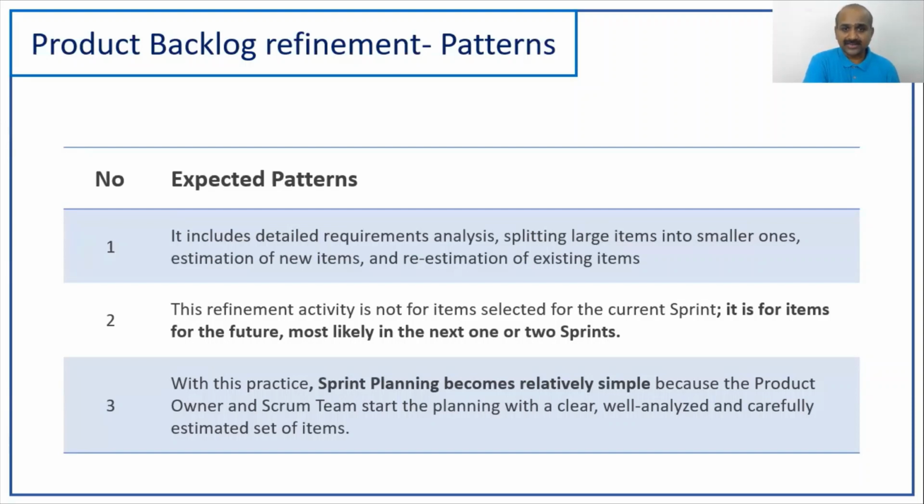The product backlog refinement session happens in the mid of the sprint. Okay, the duration should not be more than 10% of the capacity of the team, right? And it should happen in the mid of the sprint so that people are not bothered about either sprint planning or sprint demo. That's why in a 2-week sprint, it happens on the 5th day. Okay, and you can as well conduct 1-hour sessions on the beginning days of the sprint so that people can coolly groom the stories.